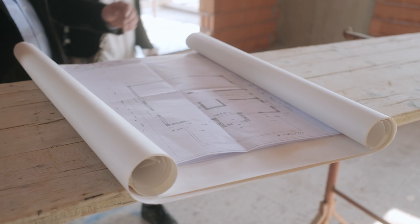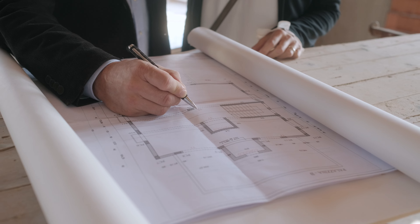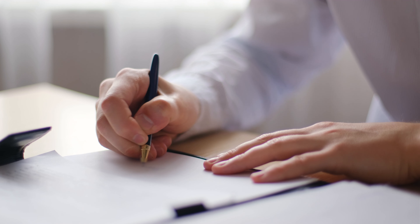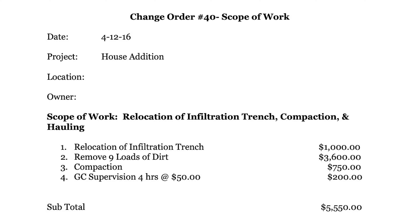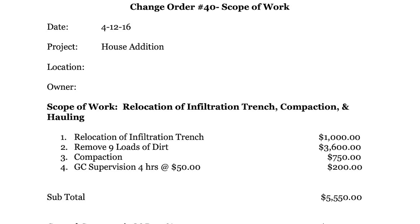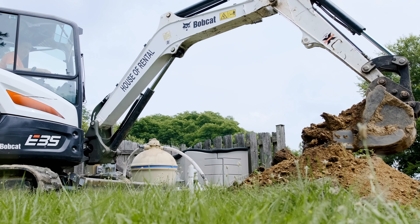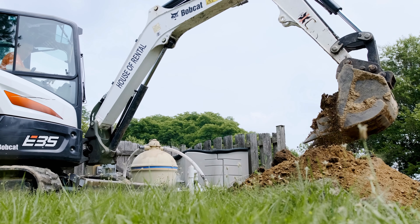The architect can serve as a guide to the homeowner to say whether or not the prices are within reason — too high or too low — because it's often the case where a contractor will lowball the price to get the job, and either not understand the work or look to add a lot of change orders. On the other hand, a very busy contractor may intentionally jack up the price as a way to say no without saying no. If you're willing to pay that price, that's simply what that contractor costs at that point in time.